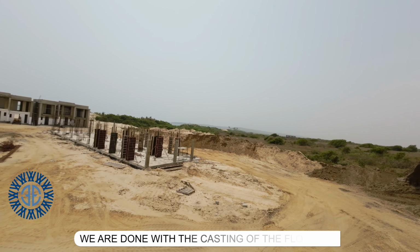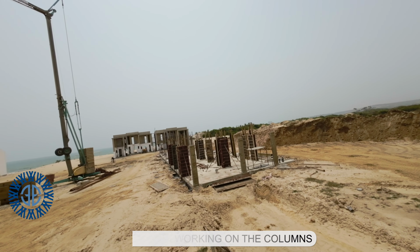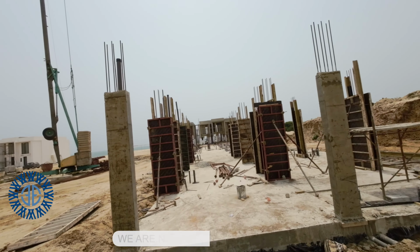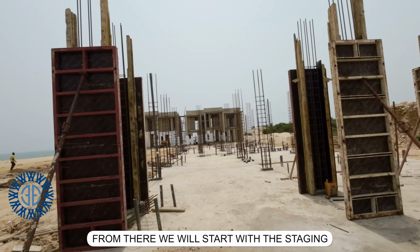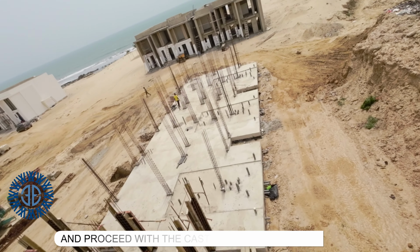Block 4, we are done with the casting of the floor bed. We are now working on the columns from the ground floor to the first floor level. We are done with the reinforcement for the columns. We are now doing the formworks and the casting of the columns. From there, we will start with the staging for the first floor slab and proceed with the casting of the